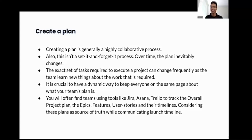Creating a plan is generally a highly collaborative process, and this isn't a set-it-and-forget process. Over time, plans will inevitably change — the exact set of tasks required to execute a project can change frequently as the team learns new things about the work that is required. It is crucial to have a dynamic way to keep everyone on the same page about your team's plan. You will often find teams using tools like Jira, Asana, and Trello to track the overall project plan. Your plan also helps you communicate launch timelines to external teams.